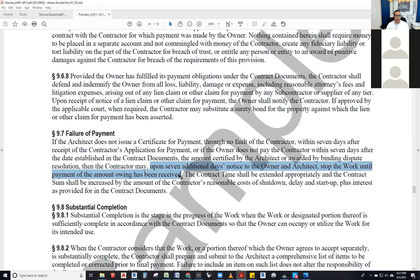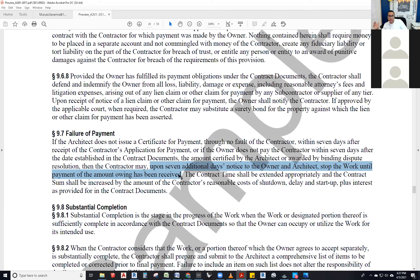If they submitted the application for payment on the 20th of the month and didn't get paid within seven days, they will give notice that they will stop work within seven more days — basically about 14 days after submission, seven days late from their payment. They have to actually issue that notice — they can't just stop — because that's when the clock starts ticking. If they don't do it that way, they're violating the contract.